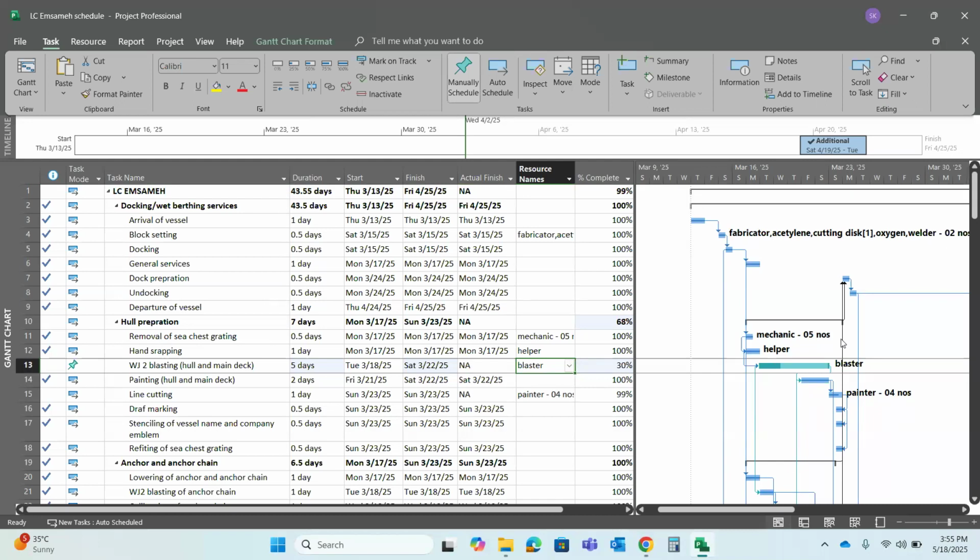You will first plan your program, your project, and then you will make it a baseline. I'm telling you, then you will update your program: how much percent of that particular activity is finished. And then you will schedule your program again. You will change the data date and it will show you the new dates. But right now I cannot see how, because in your program maybe you missed some links or you are not putting the correct schedule date, because you will shift your data date.